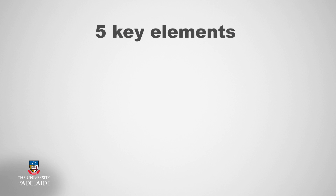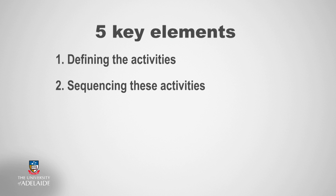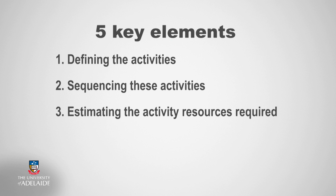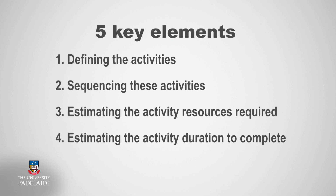There are five key elements associated with time management of a project. These steps are fairly intuitive, so let's identify the key processes before exploring each in more detail. They are: defining the activities, then sequencing these activities, estimating the activity resources required, estimating the activity duration to complete, and developing the schedule. It is important to note that the development of the schedule can only occur once all of these processes have been completed.